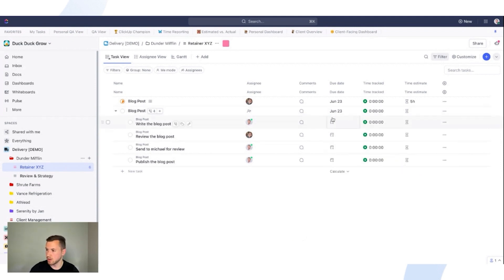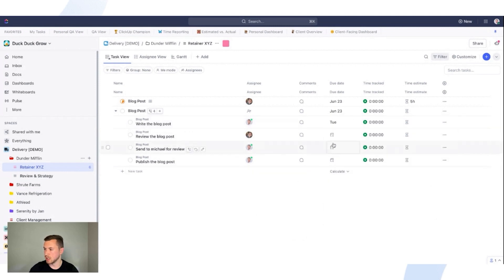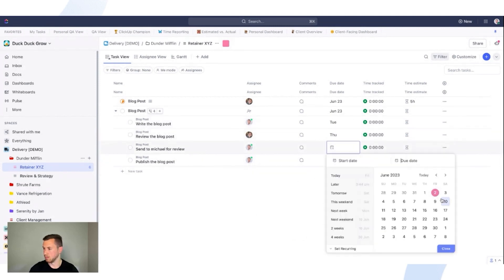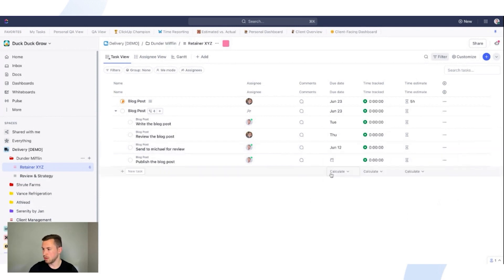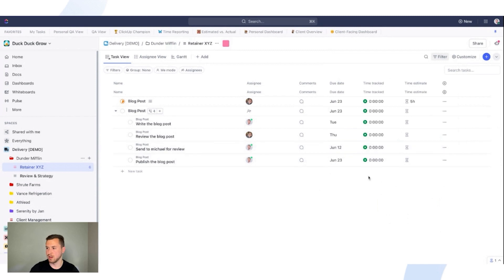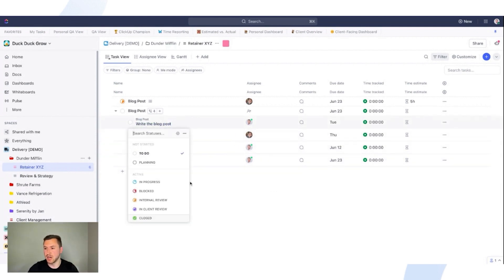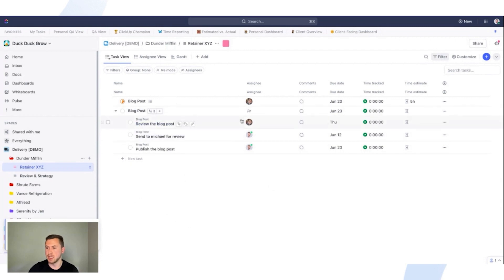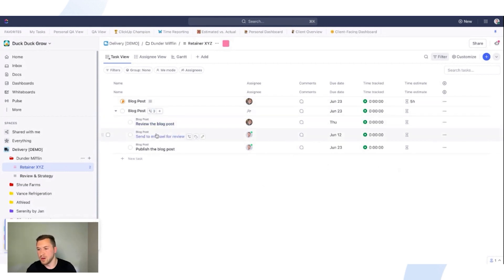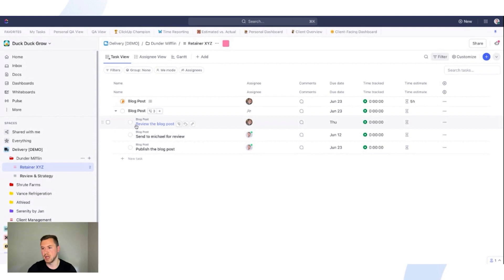And then I'm having to put due dates for when these things actually are due. So I'll say this one's the 23rd. Now writing it, let's say that's due on the 6th. Reviewing it, that's going to be due on the 8th. Sending it to Michael. I'm about to say it's the 12th. And then actually publishing it 23rd. We'll give us a lot of wiggle room there. But anyways, then you have to put the time estimates on here. And it's just going to take you a ton of time to do that. You're taking a step in the right direction because now once I write this, I can close it. And then I'll comment with Ian and say, hey, can you now review this? So we now have things that won't slip through the cracks. But again, you don't have enough granularity in these tasks. I send to Michael for review. I might need to receive it from him so we know it's in our hands. Again, you're relying a lot on statuses and you're relying on just not enough tasks to actually get the visibility you need.